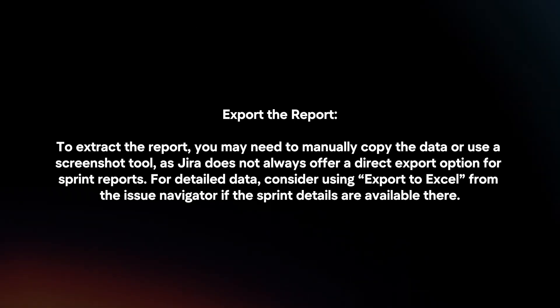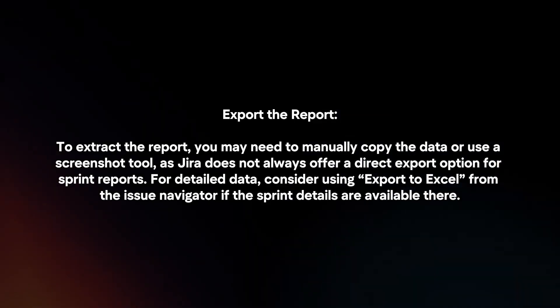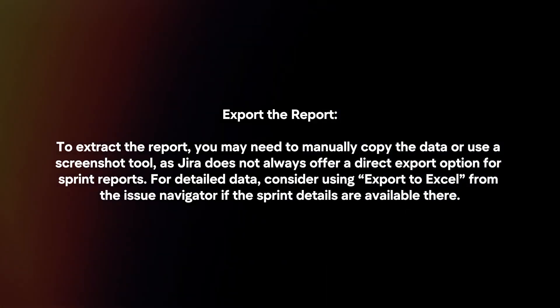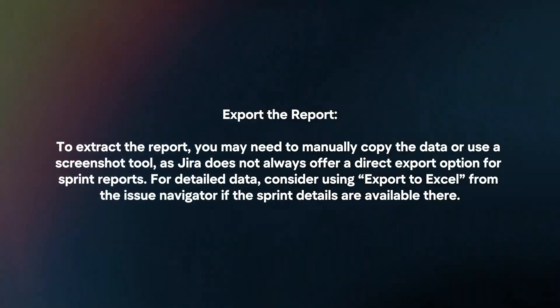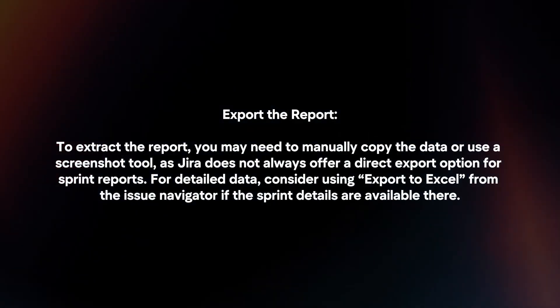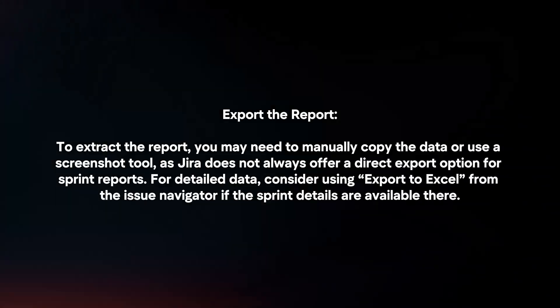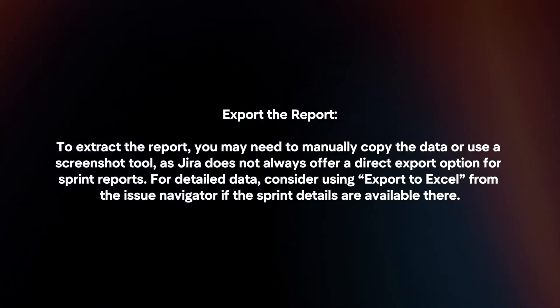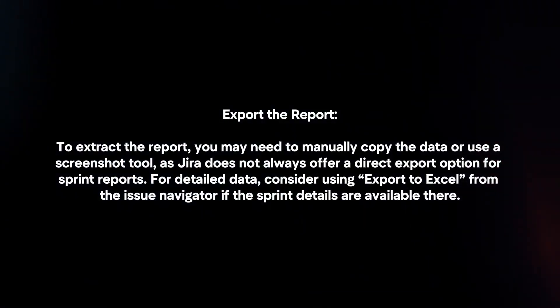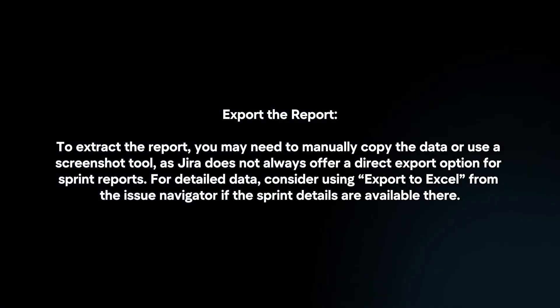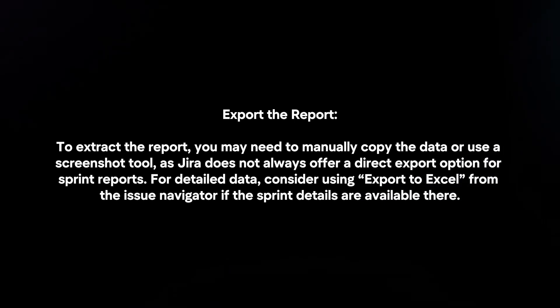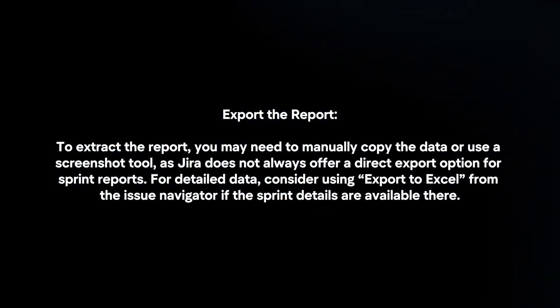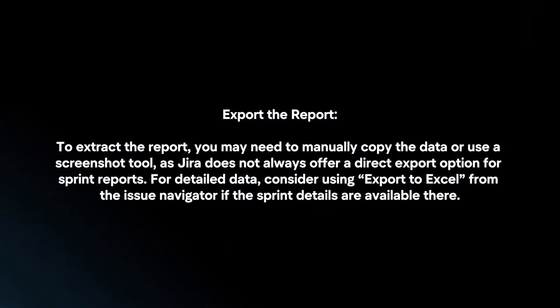Export the report. To extract the report, you may need to manually copy the data or use a screenshot tool, as Jira does not always offer a direct export option for Sprint reports. For detailed data, consider using export to Excel from the issue navigator if the Sprint details are available there.